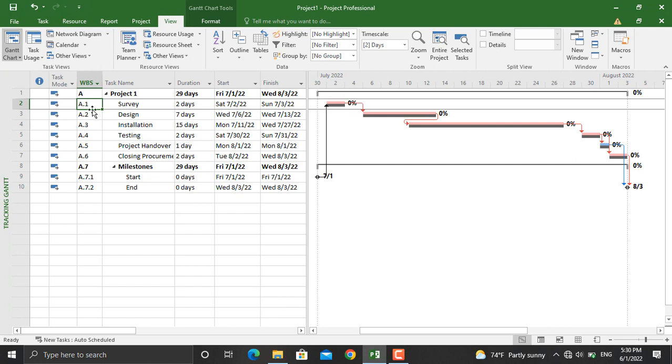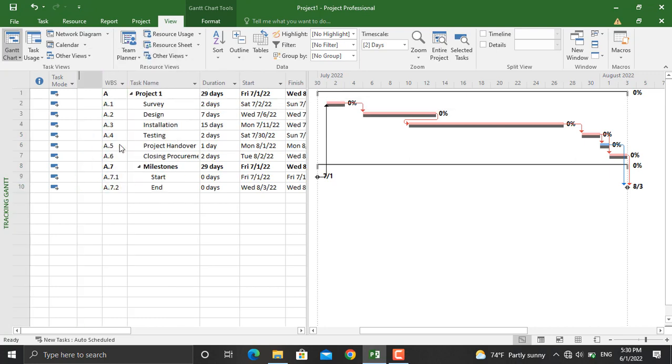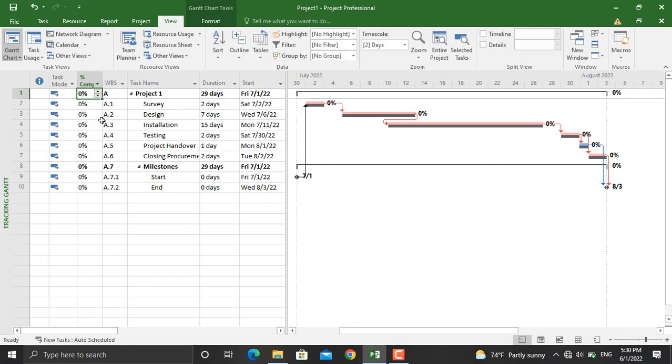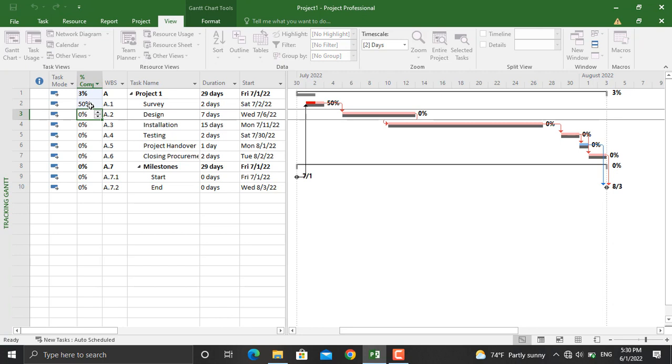And in addition, if you want to see the percentage completed and assign any different percentages completed for your activities, from here you can right click, insert the column, and select Percentage Completed. Now if you update the percentage completed, as you can see it will be shown in here as well.